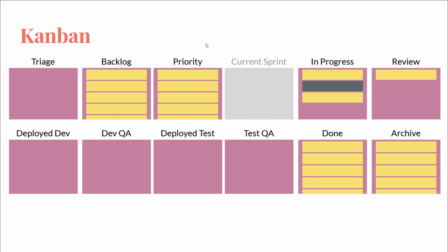And you can sort by the deadline or you can sort by priority, and then pull those things in. And that's how you prioritize stuff and you try to get through that workload. And that's sometimes the case. And that's what a Kanban board is really good for, this Kanban approach, where you just pull off the top thing of priority and you're always working on it. And whatever stuff is in progress, however many items are in there on average, that is your WIP limit. And you will often hear WIP limit associated with a Kanban approach. You'll hear that a lot more often than with a Scrum approach, where story points are more often the case.